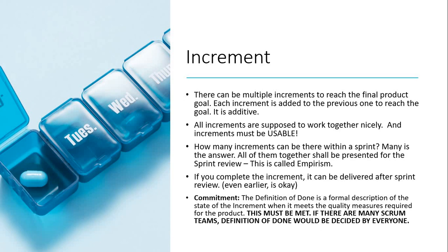If you complete the increment, it can be delivered after the sprint review. So the terminology is important here. You are going to carry out a sprint review after the increment. If you have completed the increment, it can be delivered after the sprint review, and even in case you have completed it a little earlier, you need not wait for the sprint time to be over. You can conduct the sprint review and deliver it.